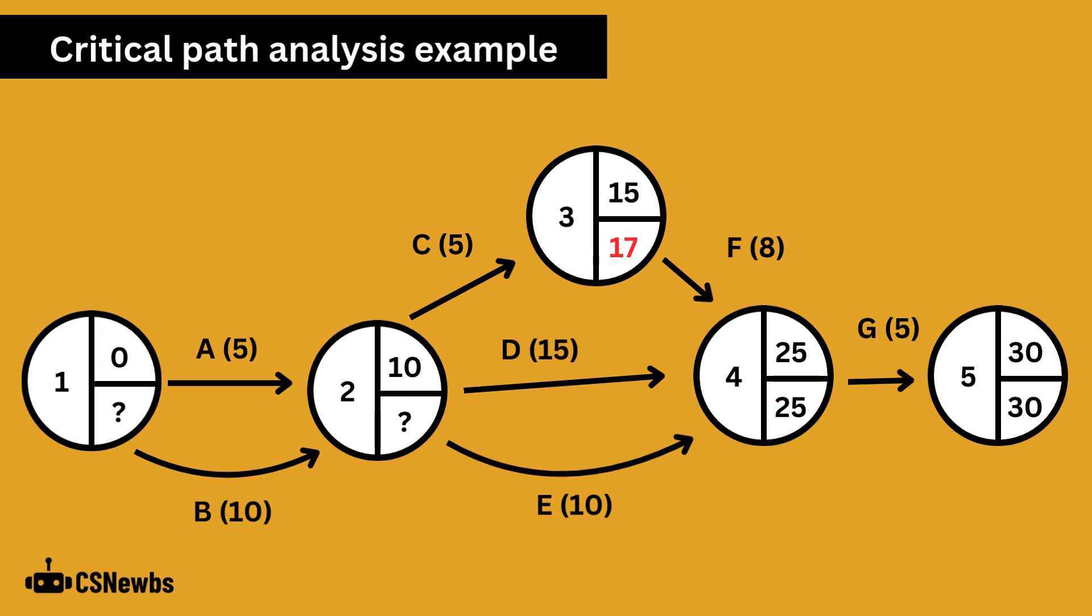Now we look at nodes 4 and 3. From the 25 days of node 4, we can take away the eight days it takes to complete activity F, and that gives a latest finish time for node 3 of 17 days. That wiggle room of two days is called float or slack. If we reached node 3 after 15 days, we'd have two spare days before we must start activity F.